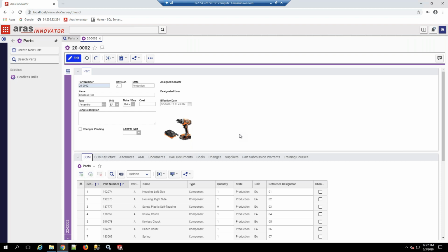I've been in organizations where if a supplier got a new copy of a drawing and it had a new rev, they wanted to requote it. You tell them, well, nothing's changed, it's just a spelling correction. Well, it doesn't matter. We quoted rev A, and now you've given us rev B, we're going to requote it against rev B. Contractually, they're probably allowed to do that. There can be regulatory issues. If you have an agency where there's an issue, there can be problems if we move something from one rev to another.